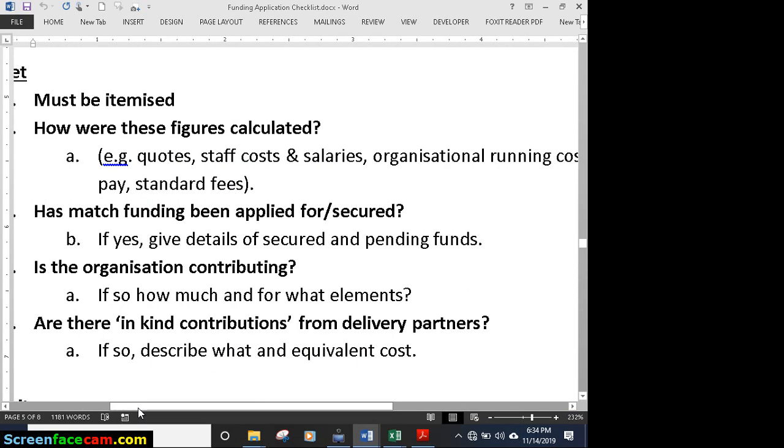Now, in terms of salaries, most of the times, they will also not fund a full salary unless a specific program officer is going to be completely devoted to this project. So all they want to fund in terms of the salary is the level of effort, okay? Because their assumption is that you're getting money from other places, and that that's not the only project that you'll be doing. So which means that in all honesty, your level of effort will be split amongst other different things or other different donors' work. Okay, I'll show you how you calculate the level of effort as well. Right? You'll see that in a practical example.